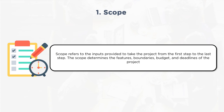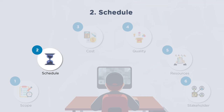There are two types of scope: product scope and project scope. Product scope covers ensuring that the features and functionality of the product are well defined, understood, signed off, and tested against those defined specifications. Project scope focuses on all the activities to be done, the templates and processes to be followed, and the skills to be applied — ensuring the project activities result in the deliverable aligned with the product scope.